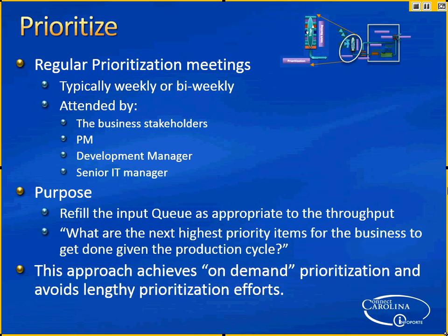So we have to prioritize things that are ready to go in. We think they are ready to be fed, so they're ready to be pulled at the appropriate time. And one of the things we avoid doing in Kanban is the argument before the project has even been defined, in the sense of the design, functional requirements, what the priority is, right? It's this priority, and you get all these debates back and forth. Well, in this case, the stuff gets in, gets defined, and when it gets to the point where there's going to be a prioritization meeting, now's where the rubber meets the road, and primarily the business people get together, and they're not doing it in an ether. They're doing it based on what is going on right now.